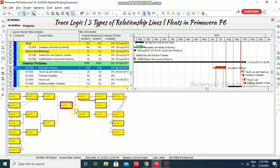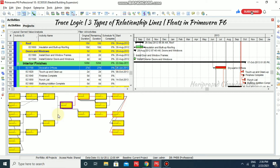These driving relationships are displayed as solid black lines. The third type is the non-driving relationship, shown as black dotted lines. If the relationships are not used to calculate the start and finish date of any predecessor or successor activity and are not on the critical path, we call them non-driving relationship lines. Black dotted lines have free float, black solid lines have total float, and red solid lines have zero float.